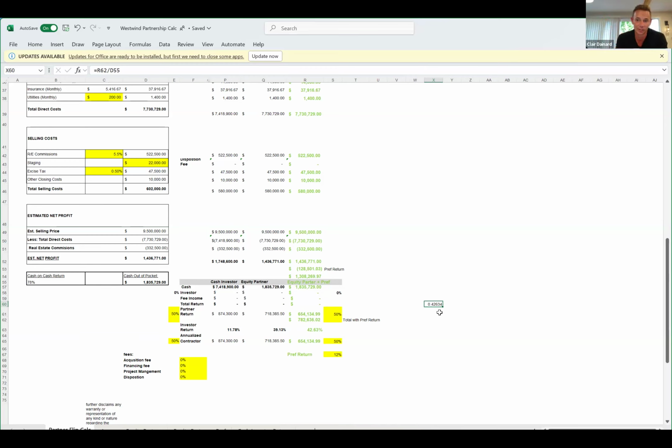I don't have to manage the subs. I don't have to manage the quality. That is his job to do. I have to design it. I have to spec it. I have to work with the permits. He handles it from there on the install. In the amount of time that I free up, this is probably saving me at least 50 to 60 hours of my time. Not only that, the stress goes down and I can focus on stuff that I'm working on in Seattle.